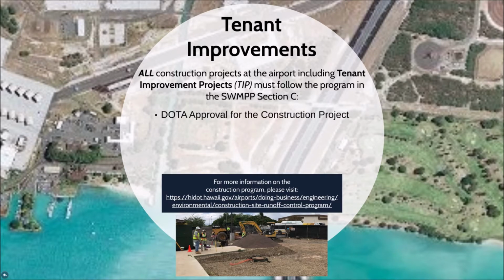Obtain DOTA's approval for the construction project. A construction plan review is required to ensure that BMPs are adequate for the project, the proper permits have been obtained, and post-construction BMPs have been considered for projects over 1 acre. Specific forms are required for this plan review, and tenants should refer to SWAMP Section C prior to submittal.